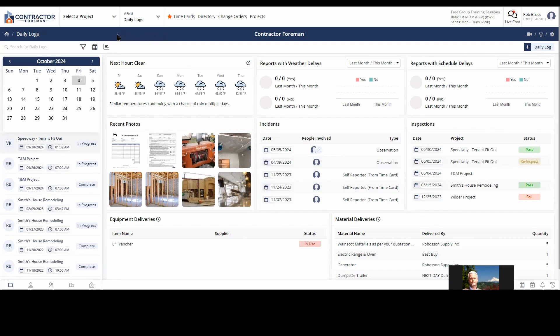Daily logs don't take a half hour, they should take you a little over maybe five minutes. Ours are very automated, but my main point here is I don't care if a job is three days long or three years long, you should do a daily log on every single job that you do, every single day that you're on that job.